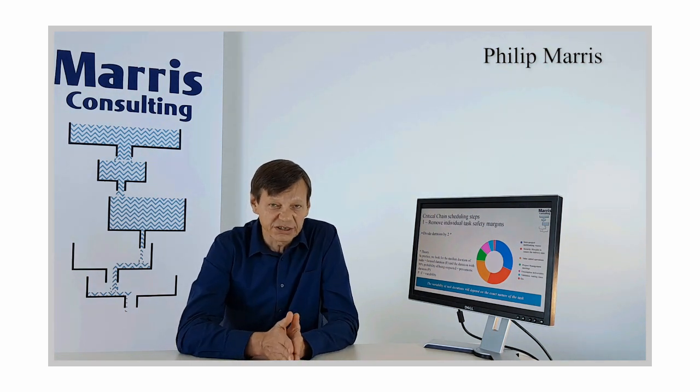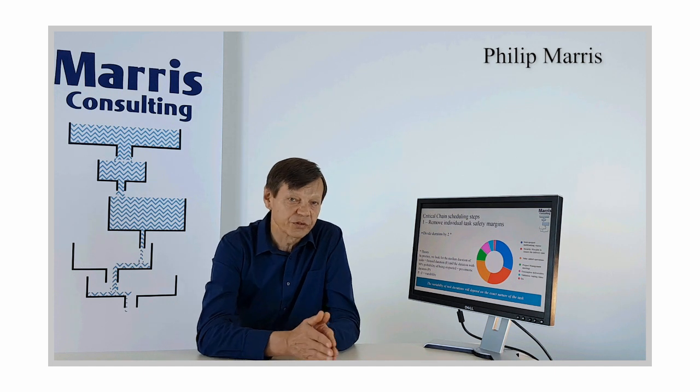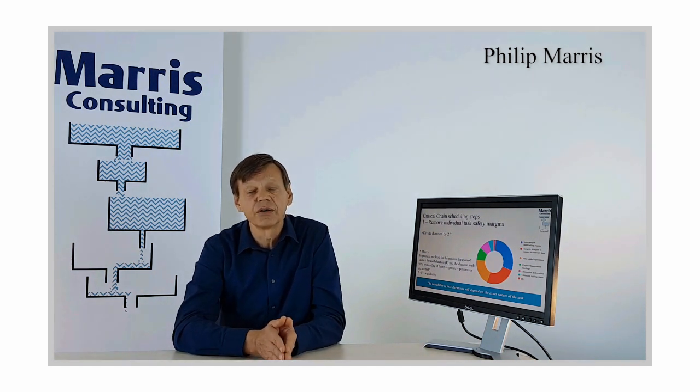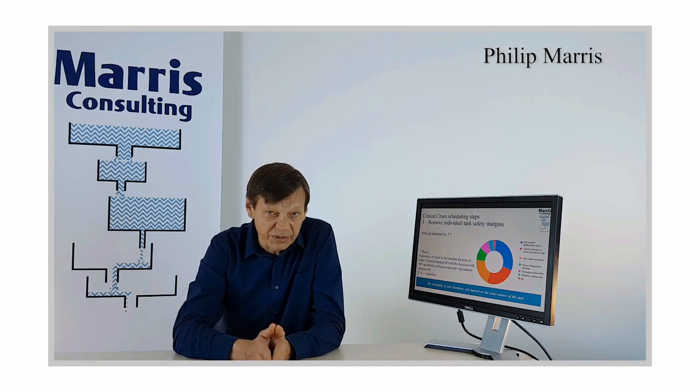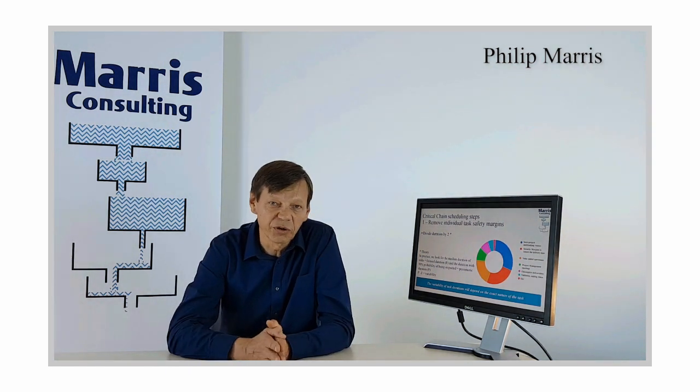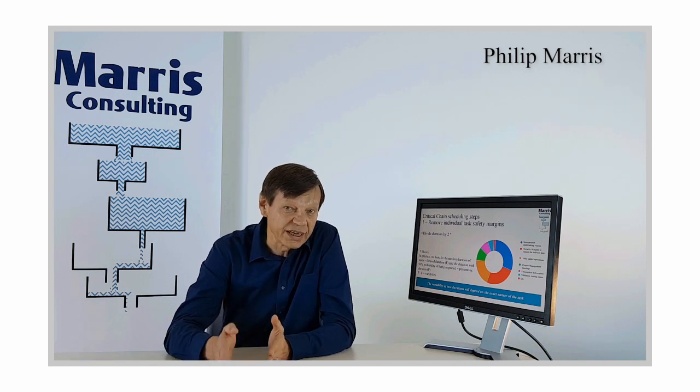To be more precise, we ask them for 2 times. We ask them for the focus duration as I just described it, which is the most probable focus duration, and we ask them for a pessimistic duration, again focused. You have perfect conditions, but if you find the work is a lot more complicated than you expected, what's your worst case scenario, or what's your 80% probability, where you think that 80% of the time you'll be able to do it in that duration.